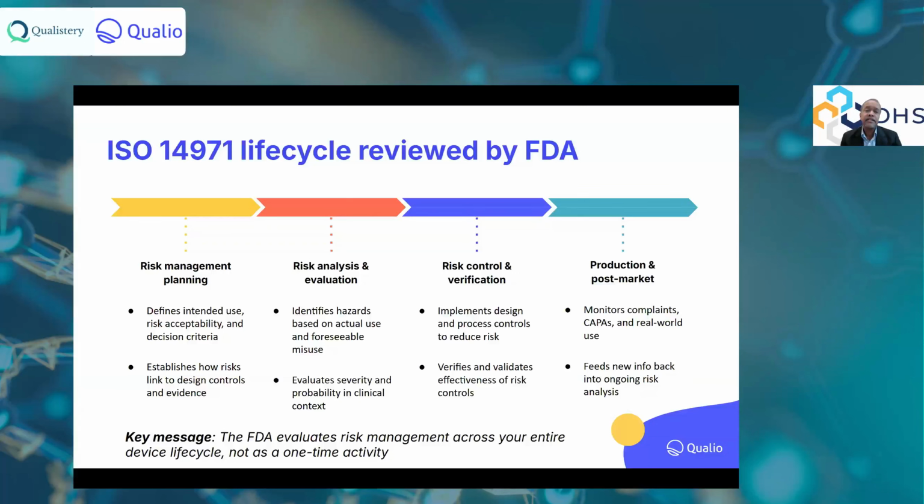And the engineers don't have the luxury of picking the severity associated with a failure. They have to map it to one of the line items in the hazard library established by the clinical and risk team, right? Which is then aligned with the regulatory strategy. But of course, we depend on engineers to identify component failures that may happen. Then they map it to the risk associated with the hazard. They get the severity. They work out the likelihood, the probability of that happening.